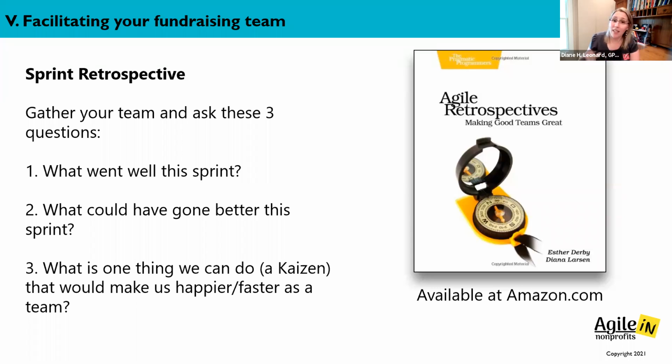If you did nothing else from the Agile conversation today, from the sprint framework, or the Scrum framework that I'm showcasing for you, if all you did was try the idea of a sprint retrospective, consistently having the conversation about what went well, what didn't go well, what could we improve together? Not about the work, but about how we worked as a team.